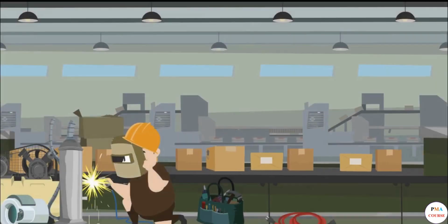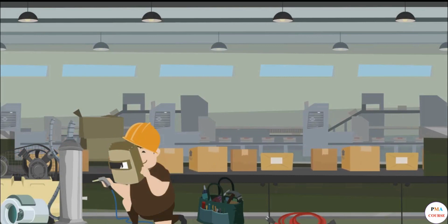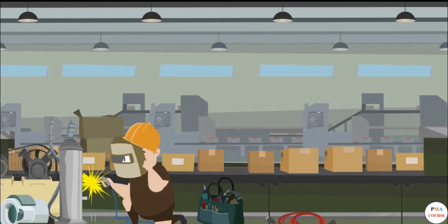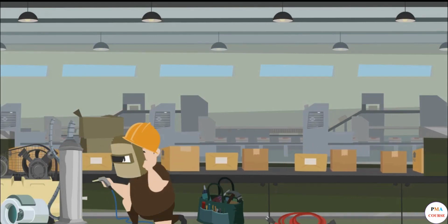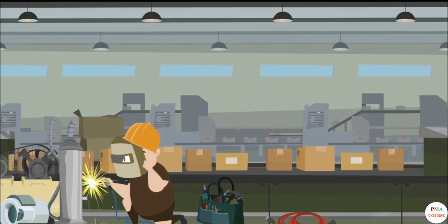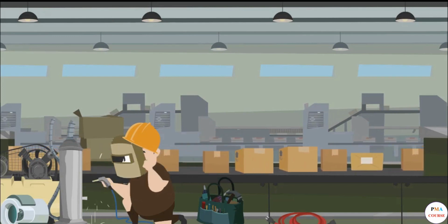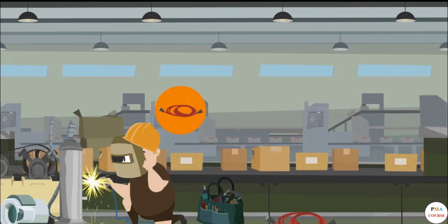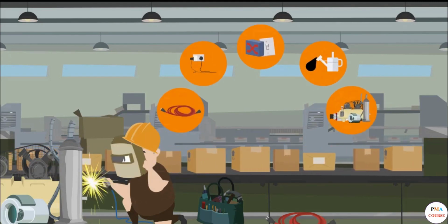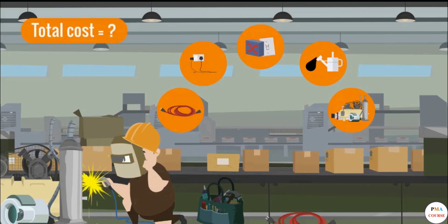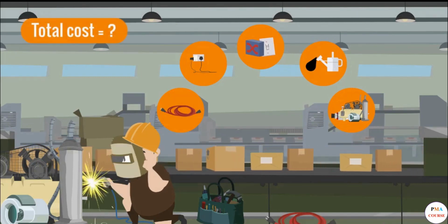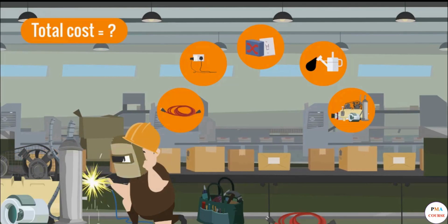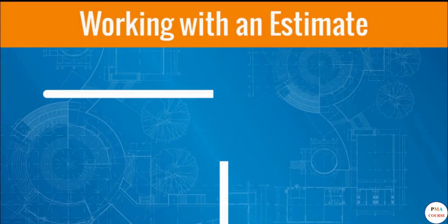Welcome back. In this new case, engineer services, we do not have an agreed final amount. Instead, we have a rate for the engineer's services, daily or hourly rate for example, and prices for the materials they will use, let's say specific cables, plugs, switches, machine oil, spare parts, etc. We will not know exactly what the total cost will be before the work is completed. We will need to work with an estimate here.